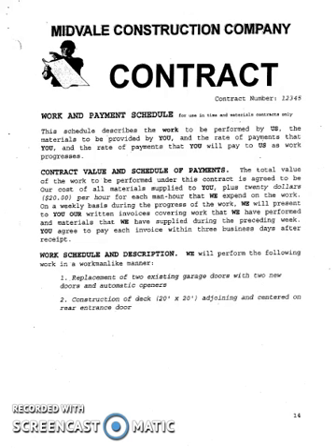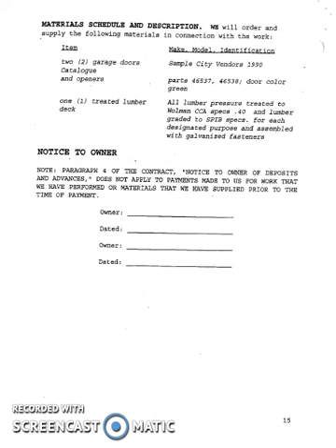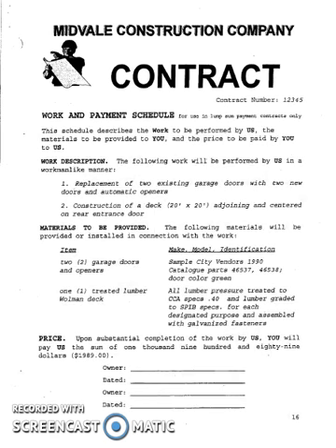Here we have a work and payment schedule for time and material situations. So again, like I mentioned, in this specific contract here, you can see that they're paying $20 per hour for each man hour that's worked, and of course for all the materials that are consumed during the project as well. And here's a work and payment schedule for a lump sum contract and agreements here. This is just a one-page payment schedule here.